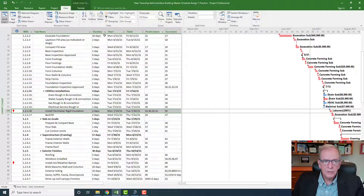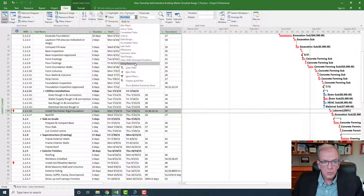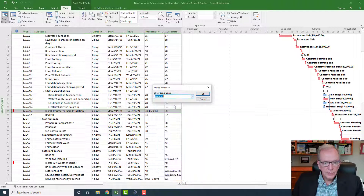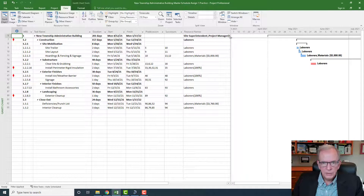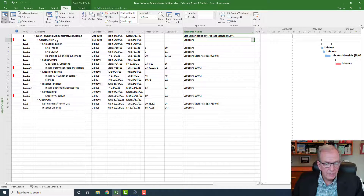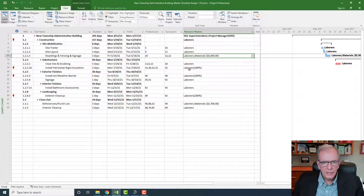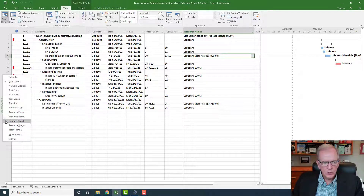Under the View tab, you can filter by resource using 'Using Resource' to zoom in on the laborer resource and click OK. Now it only shows activities where laborers have been assigned. I can see I've assigned a laborer to the construction heading — meaning one laborer is there the whole time — plus laborers assigned to some individual activities. I can also check the resource sheet: it's set to 200%, confirming I said two laborers are available.